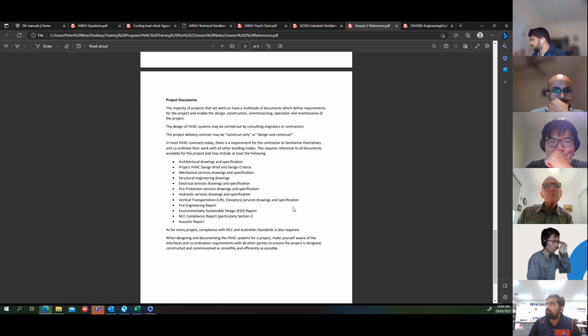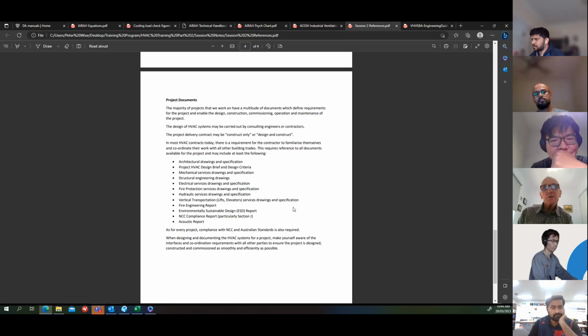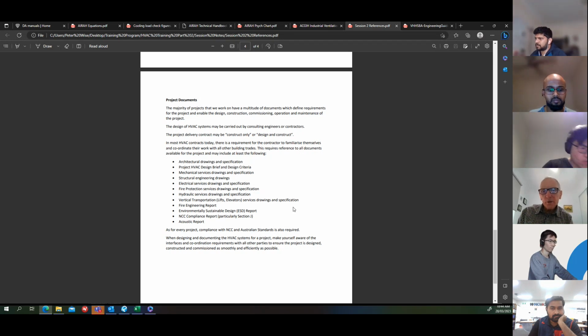The majority of projects that we work on have a multitude of documents which define the requirements of the project and enable the design, construction, commissioning, operation and maintenance of the project. The design could be carried out by consulting engineers or contractors, so we've got representatives of both here. The project delivery contract may be construct only or design and construct. Construct only, we have talked about this before, is where the contractor tenders a project designed by somebody else, usually consulting engineers. And really they've just got to install what's been documented.